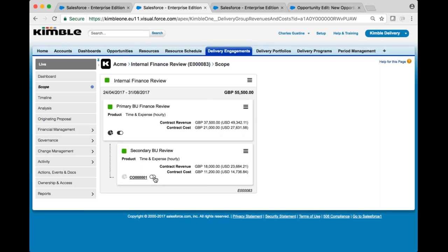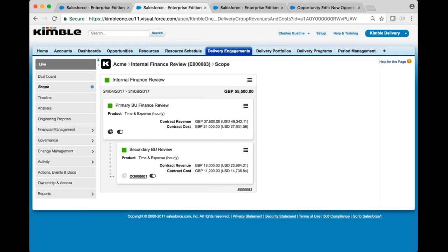In fact, the last step would be for us to actually activate this particular element so our resource could begin capturing time and expense against it. So with this first scenario, we've demonstrated the simple creation of a new change element that was effective with the creation and approval of a change order. Remember, we needed the change order in this case and not simply a narrative, since we had an internal approval process to be completed before we commenced work on the project.